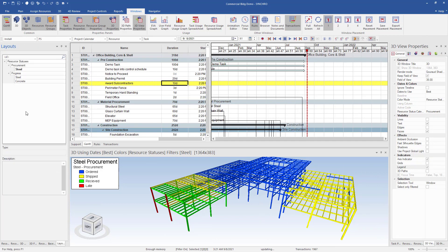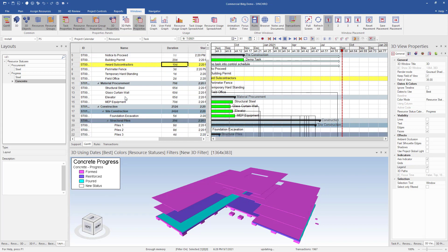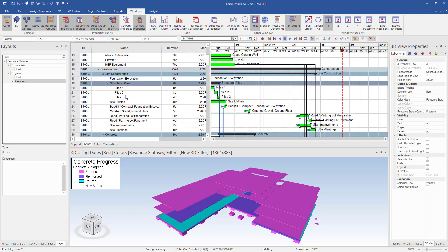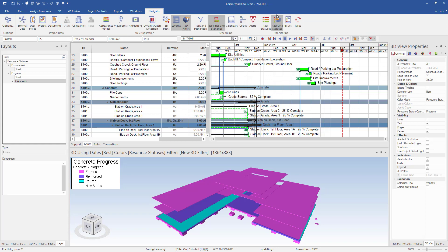Our three uprights are now green and received. If we jump over to our concrete progress, we can see our slab on grade 2 has been updated to reinforced and is now purple. Let's scroll down in our schedule to our slab on grade area 2 task and we can see it is set to 25% progress.